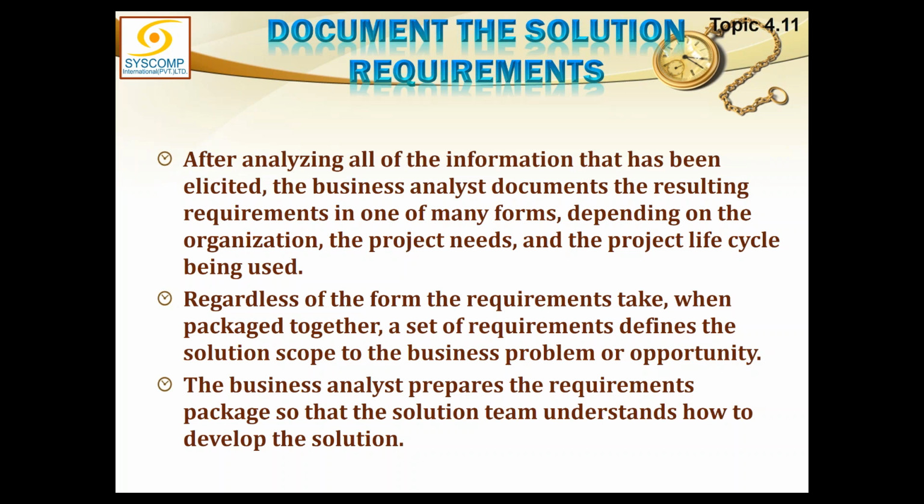Regardless of the form the requirements take, when packaged together, a set of requirements defines the solution scope to the business problem or opportunity. Now, do you remember we did talk about a solution statement in the beginning? When we were doing the need assessment, we created two documents. One was the solution statement and the other was a business case. Now that you have done the elicitation, you have done the analysis and planning has already been completed, we are having all the data. And that solution statement which we created then can now be defined as a scope. Now we have very clearly defined the solution scope to the business problem or the opportunity. So this solution scope is going to ultimately become the project scope. So we start from the solution scope from here.